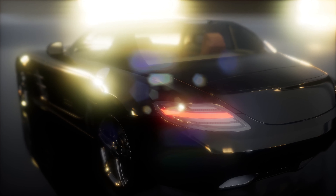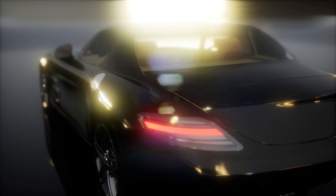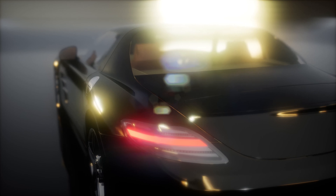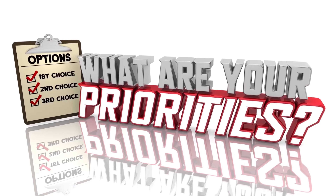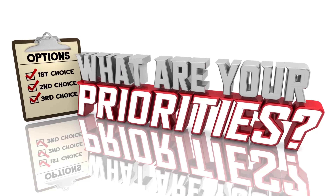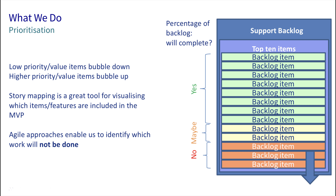Using the waterfall approach, the entire product is developed before delivering to market, so the end date is more easily identified. Since with an agile approach the product is delivered incrementally, there is a need for the organization to define the point of market delivery to better define the measurement boundaries. Using the MoSCoW method as an example, various components or features of a product can be prioritized, which is helpful for determining what really represents a minimum viable product, or MVP. This prioritization can be visually represented in agile with the use of a product backlog.